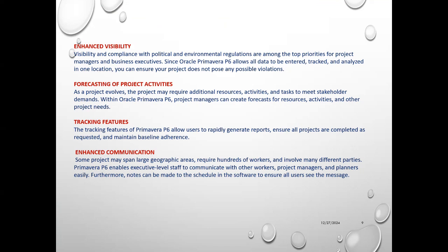In a monthly based look ahead, you can do a 12 week look ahead, or a 3 month look ahead, or 8 week, which is a 2-month look ahead, or a 4 week, or a 1 month look ahead, or a 2 week look ahead at a simple level. Minimum, we do a 2 week look ahead. As a part of your weekly report, you give the 2 week look ahead of what you are going to plan to do against your actual planned work. What you are planning to do for the next 2 weeks. In one click, I can get this information from Primavera.